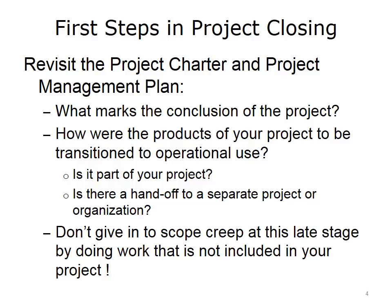Make use of processes already set up in your work environment. Most healthcare organizations have a change control process for these situations — be sure to adhere to these. Community physician offices and single practice offices may not have a process set up, so you will need to set one up yourself and include this in your planning. Be mindful that the process must fit the work environment. Requiring many people to review a change in a small office will not work. Review your plan with the people who will execute it, listen to their suggestions, and incorporate them.